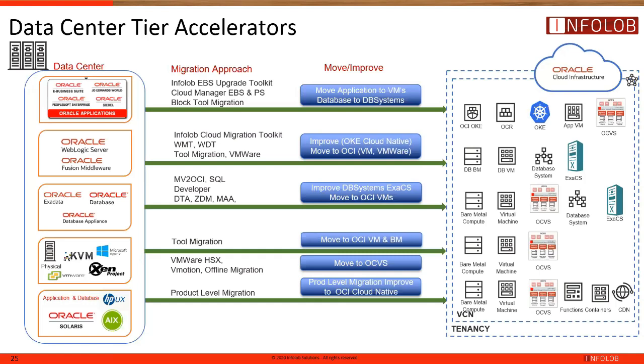There are any number of tools now that Oracle has available to help with the data migration. The same thing comes into play if you have a large amount of data, whether it's a couple hundred gig or 2 or 10 terabytes of data. It takes a while to move that initially. So trying to squeeze that in right before go live usually is not the recommended approach.